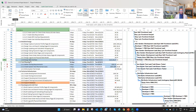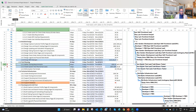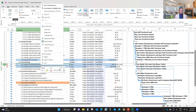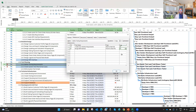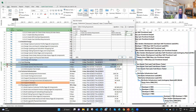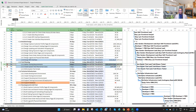Now let's say there is a relationship between design ERP interface and gather requirements. As you can see, activity 31 — design ERP interface — and this activity have a finish-to-start relationship. You can right-click and select Information to confirm — and it shows predecessor 31. Since the duration is 10 days, I need two days of waiting time to wait for approval of the design before I can start gathering testing requirements. So you would enter a positive two days in the lag field, and that would be a lag time. So the lag time is plus two days.